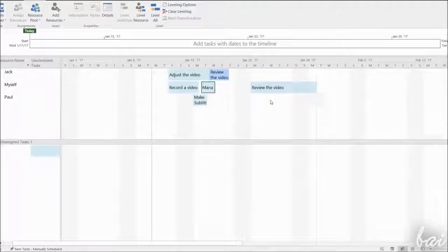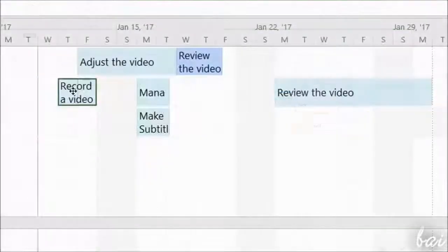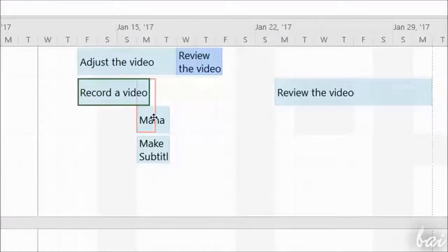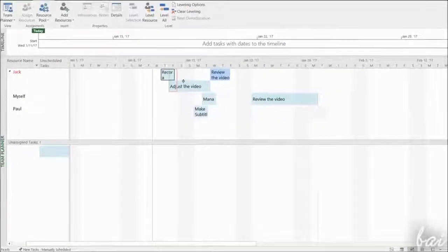When you come back to the Gantt chart workspace, you will see the resource names assigned to each task. While assigning tasks, Project highlights bad entries through a thin red contour. For example, when a task starts on a non-working time, or when you assign too many tasks to a single resource, making it over-allocated. In case a resource is over-allocated, you have to distribute the daily working hours in the correct way.